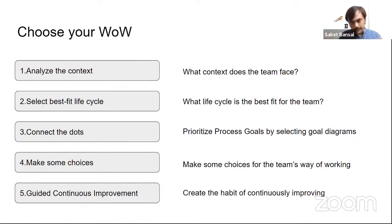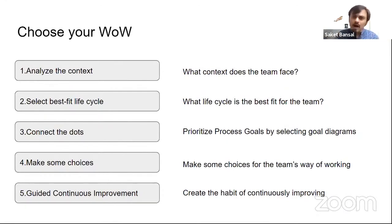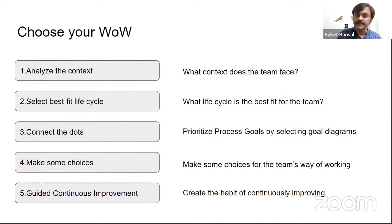Once process goals are understood, you need to make choices about how to achieve them. For coordinating activities, you could do a daily 15-minute meeting or use a digital dashboard. If your team members are spread across multiple geographies and time zones, you may prefer not to have a meeting — you'd have them look at a digital space instead. Another team working in roughly the same time zone might use a 15-minute meeting. That is how choices are made. Even if the lifecycle is the same, different teams can have different ways of achieving the same process goal depending on their context. That is the fourth step.